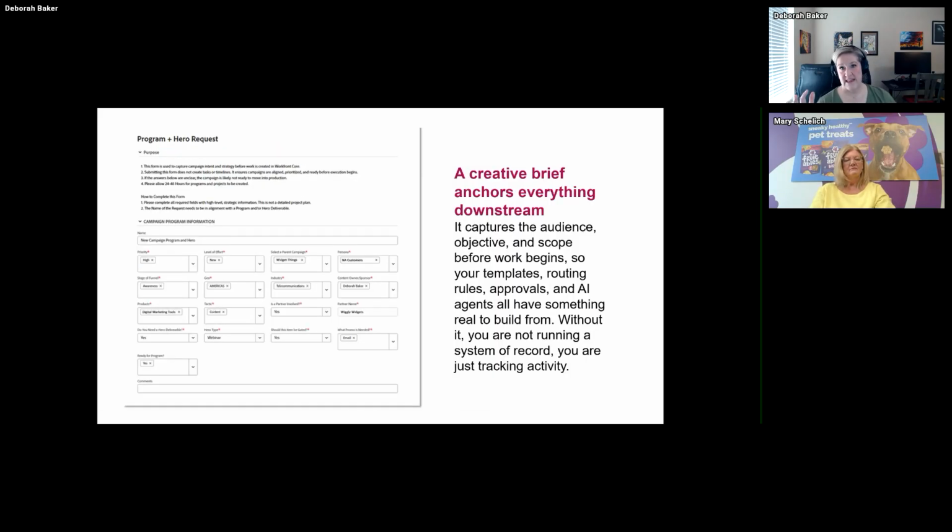So what was the item that started to connect the 2 channels together from planning into core? Well, we needed to make a brief that people wanted to use, and we needed it to mean something. And so by identifying these basic questions and what we're required to get into the system, we were then able to use a trigger. And right down here where it says ready for program, this yes column in this custom field is the trigger to tell Fusion that it's ready to build a project.